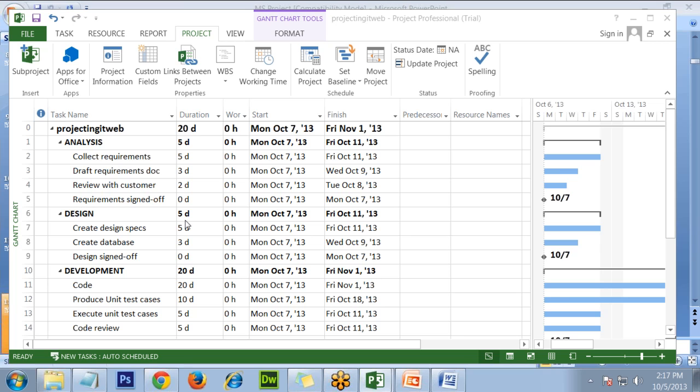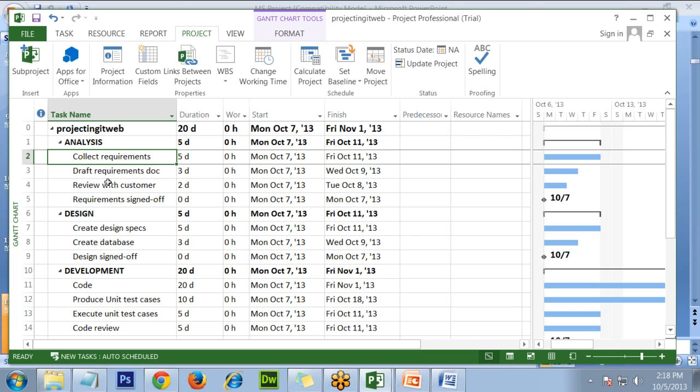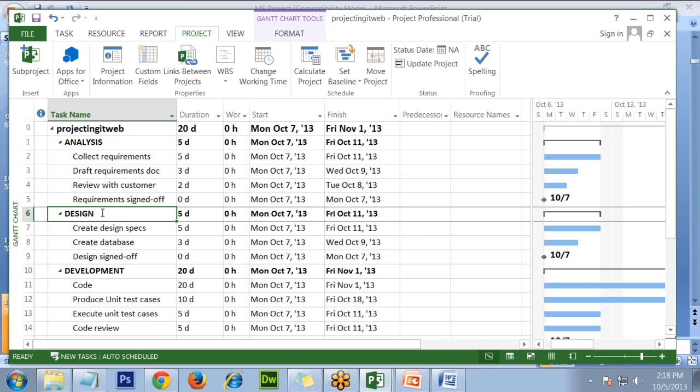We capture dependencies for every task. Now there might be a few tasks which may not require anything for the task to begin. You have predecessors and you have successors. Predecessors means what is required for a task to get started, and successor means what happens after this task. The way we create dependencies in Microsoft Project is we go to the first task. Usually people do not create dependencies on summary tasks, although nothing stops you from doing that. You can create dependencies between summary tasks.